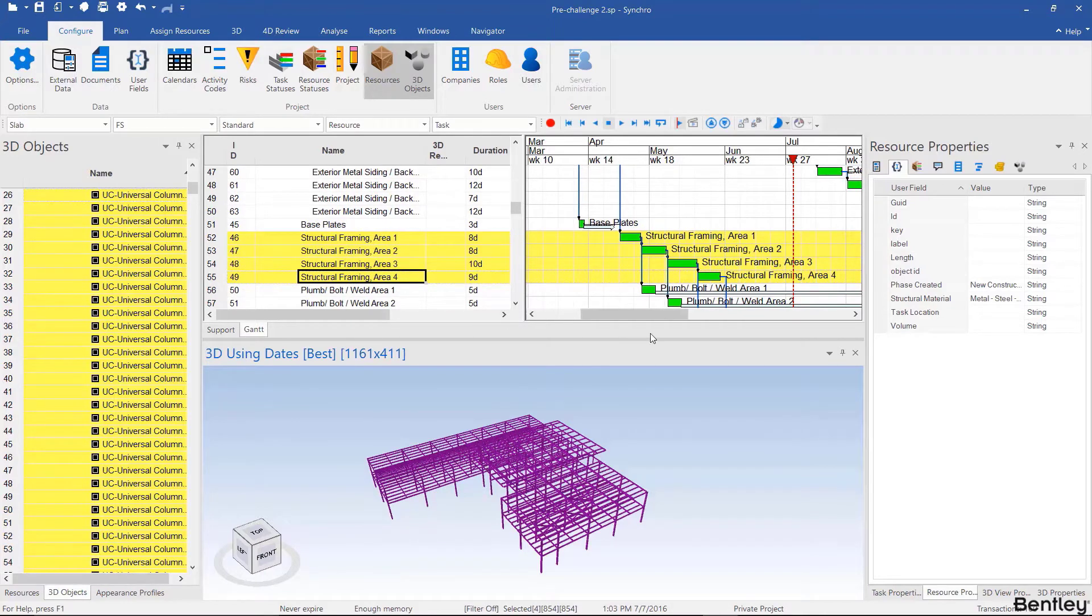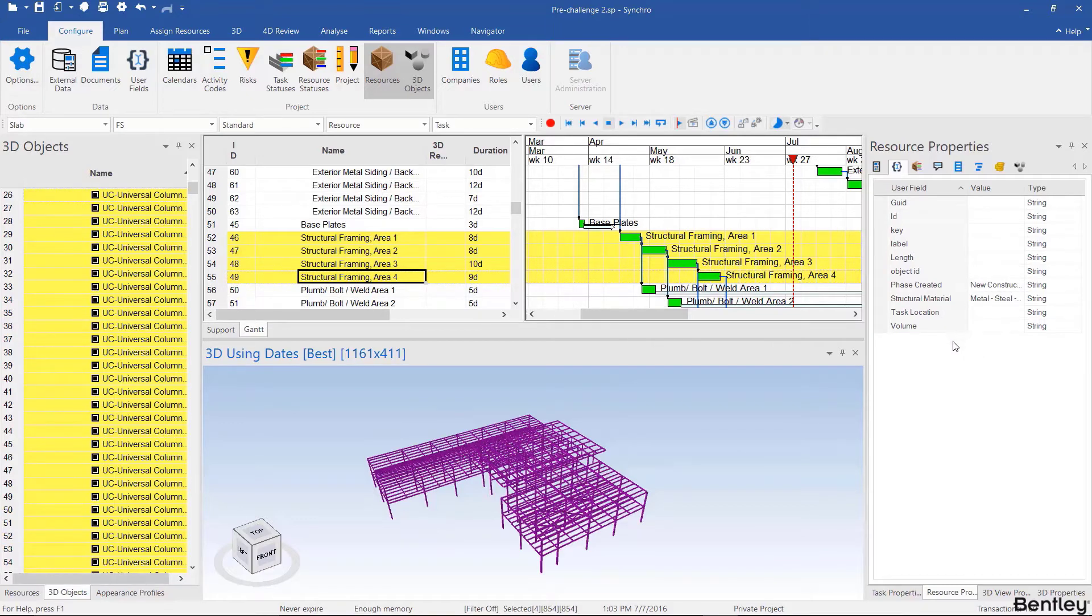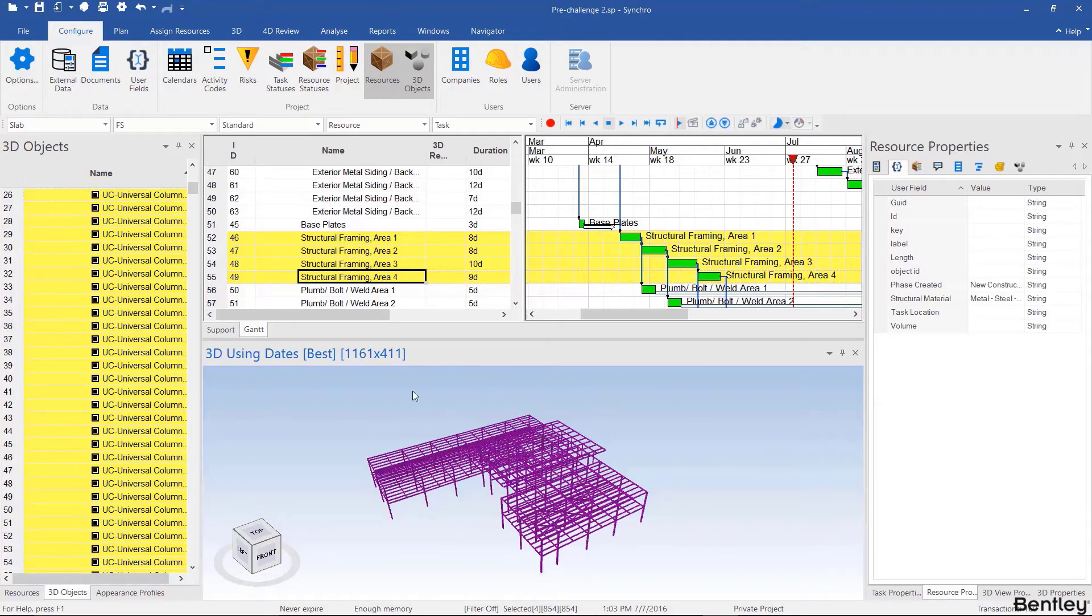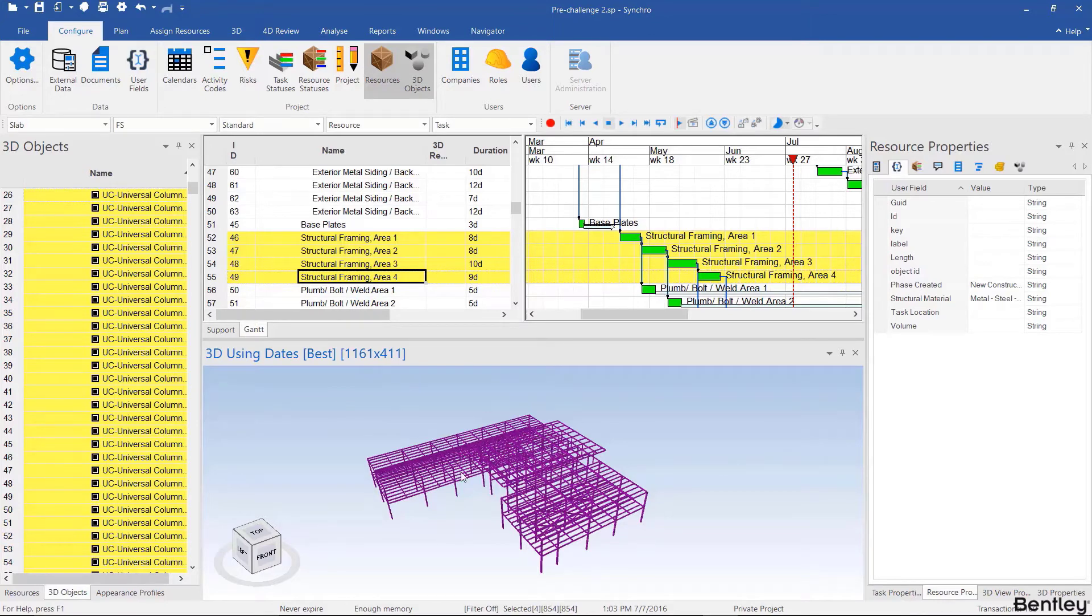When you have more parameters to auto match, for example the area as well as the CSI code or the trade or the subcontractor, then you wouldn't have to use controlled auto matching as much and you could potentially get away with just using auto matching without selecting anything. But this is perfectly valid so let's do that.